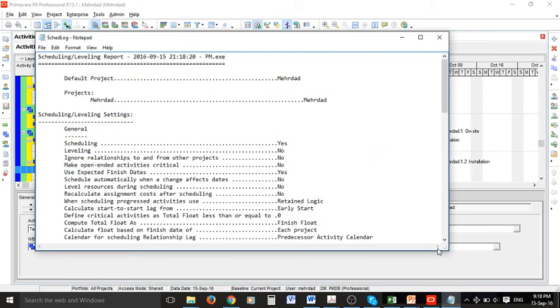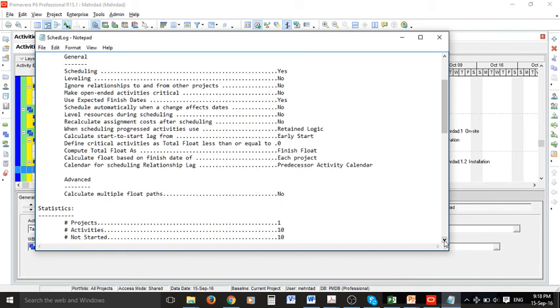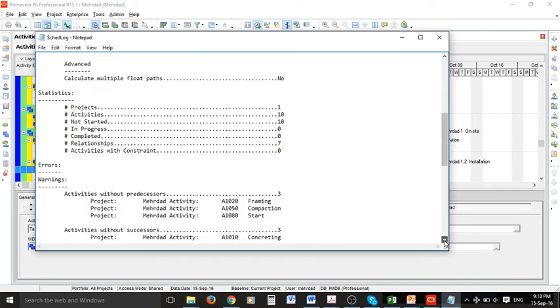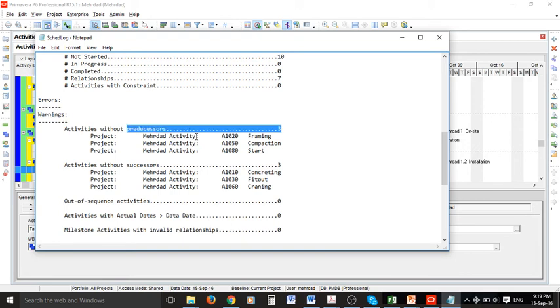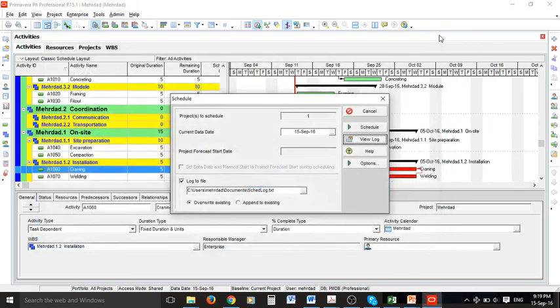There should be some warnings about this. There you go. As you can see activities without predecessors, and these are framing, compacting and start. And activities without successors are these three. It is very important to resolve these issues to have a closed network of activities. And your planning is accurate in this case.